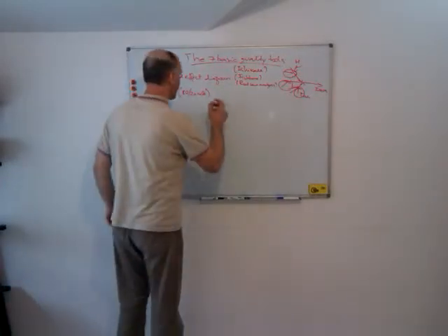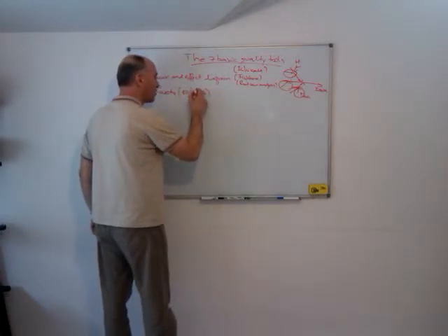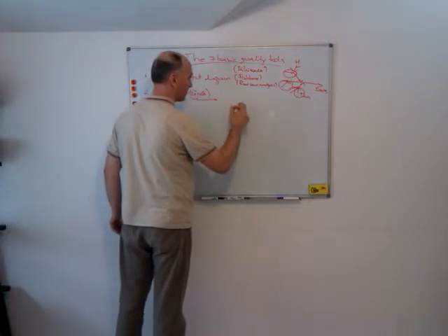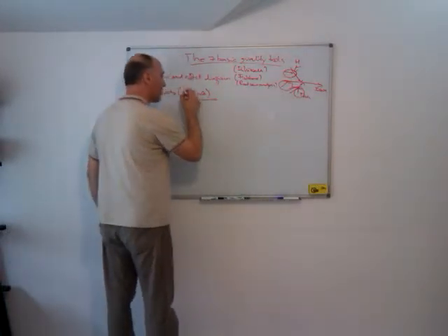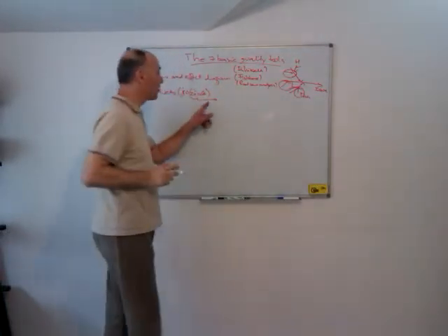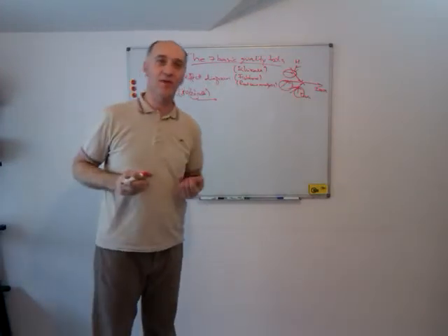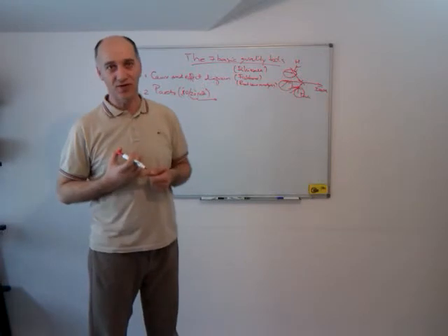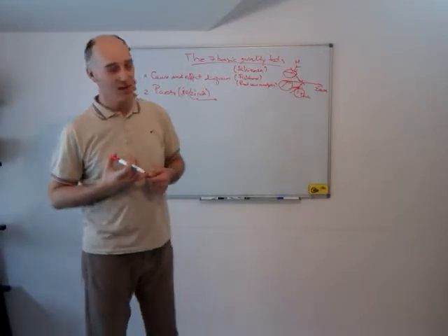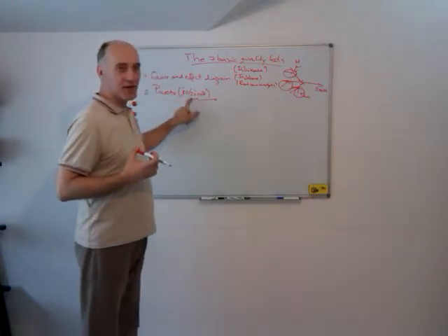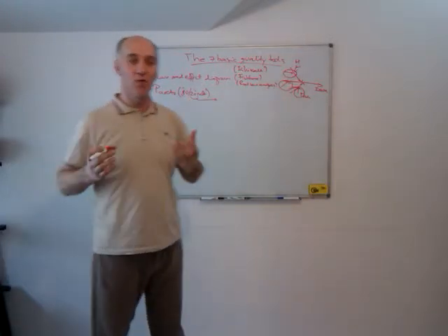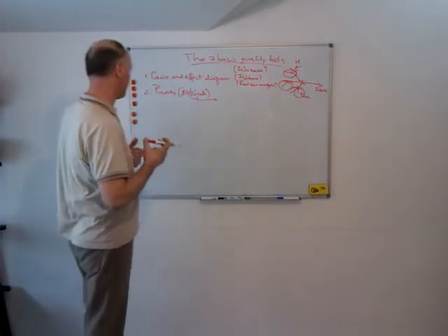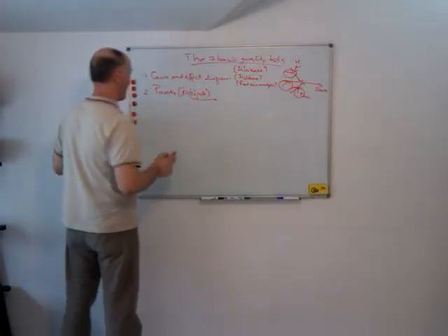Which means, in other words, that if you take action on this 20% of causes, you will resolve most of the issues. That's why it's important to concentrate the efforts in project management. Imagine that you will have problems in your projects, and we all do as project managers. That's why we have to concentrate our efforts where we can get the most outcome. So that's Pareto.